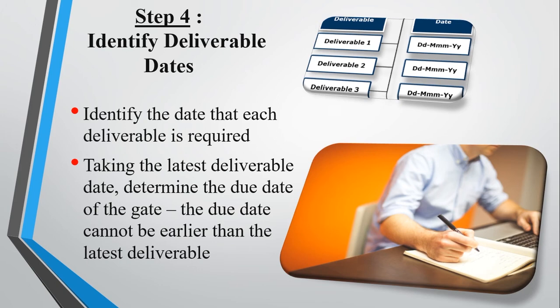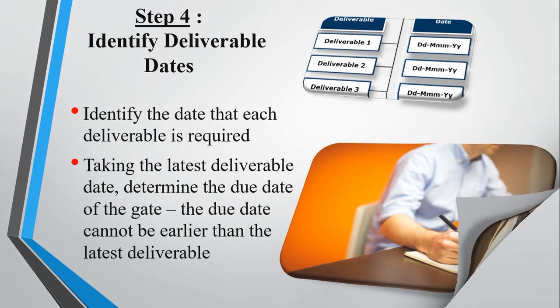In most cases, I would always try and drive it towards the early completion date, such that I still have a wider float to manage. But again, these are target dates that we at the project level then take. And should we not meet it for any reason, we have the opportunity to recover before we go into major recovery plans. Again, this is my thought process and how I manage my teams, but you may have a different view to that.